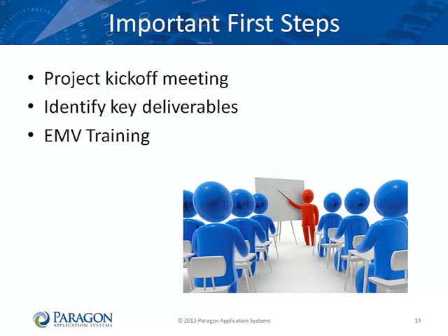What are their key deliverables and tasks? Unless the team members have a basic understanding of EMV, it will be very difficult for them to determine the tasks and the time required for their part in the project. But they must provide this information to the project manager, even if it is initially at a very high level. So, EMV training is absolutely essential. Otherwise, the team is just guessing, and your project schedule will be based on those guesses.